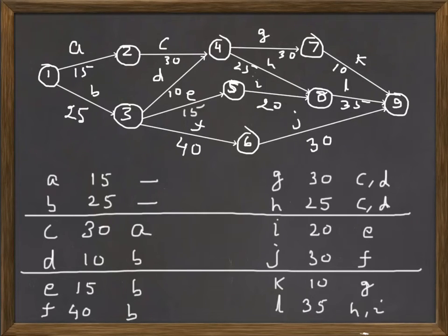So the project which we have taken, where these 12 activities are there, and their times given here, and immediate predecessor relationships given here. This is the activity on arrow network diagram, and the convention is that we write the activity symbols above the arrow and the activity time below the arrow to avoid any confusion.